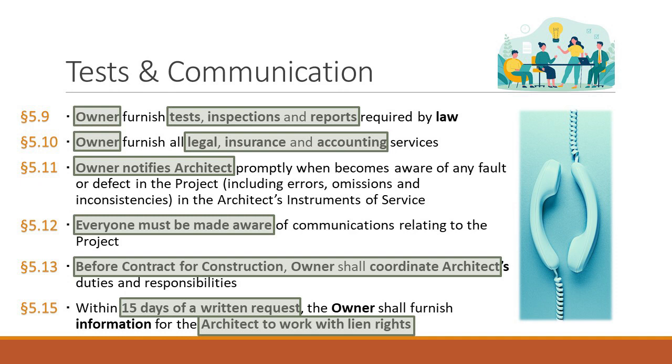And if any testing needs to be done, the architect may point out, hey, we've got to run a test here, but it's the obligation of the owner to organize that, to pay for it, and to make sure all that information by law comes in.